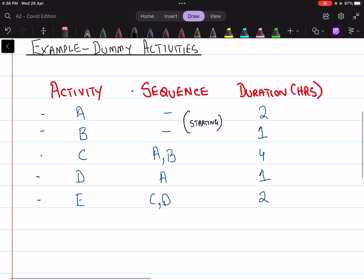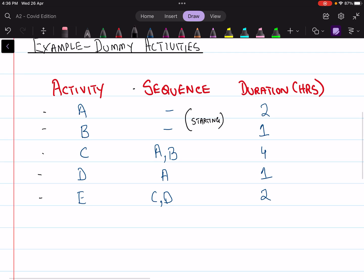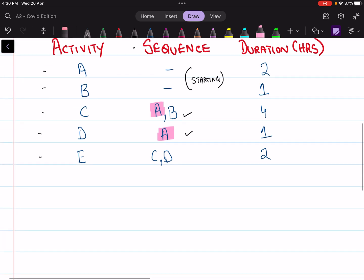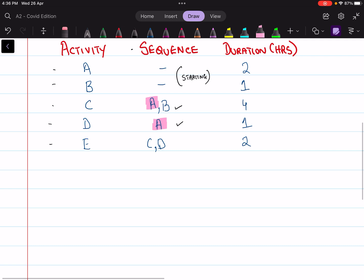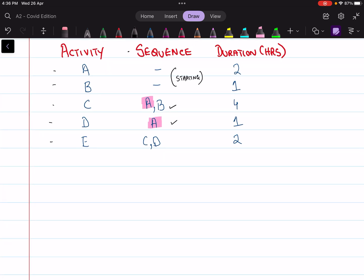Activity C requires both A and B to be completed, but activity D requires only A to be completed. This means activity A needs to end together in conjunction with B, and also needs to end separately. If you follow the traditional path of solving CPA questions you won't be able to solve this, because this question has an additional complication — the existence of a dummy activity. Let's move to the solution.